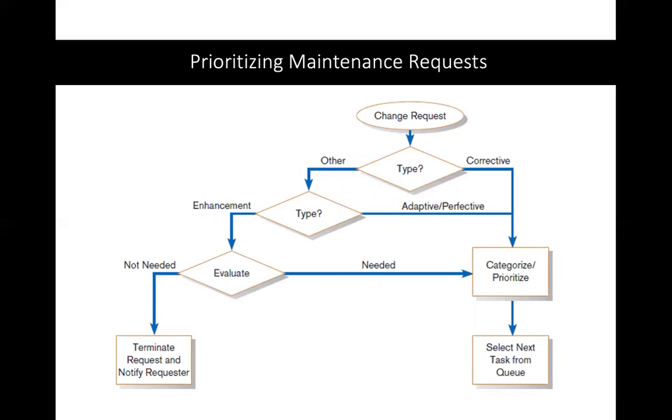Here we have a change request system, and in my experience, this is absolutely the way it happens. In my bank, at Merrill's and Bank of America, we had a dedicated team whose sole job was to manage the change request system for any information system environment in my world. And every Friday morning, we'd get on a call and go through each request. It had to be raised by Wednesday, and so on and so forth.